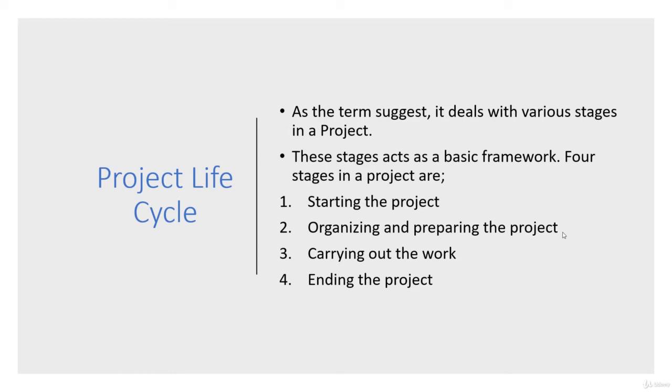And then, of course, the ending the project. All companies, all industries have certain specified procedures to end a project. Let's say in case of software projects, there will be a code freeze time. So usually it could be 2 to 3 weeks before the production deployment date, so that if any change needs to be done after the code freeze date, then special approvals are needed. So all of that, if any project demonstration is needed before deployment, this is the stage when that is done. So all the formalities which are needed to end a project are done here.